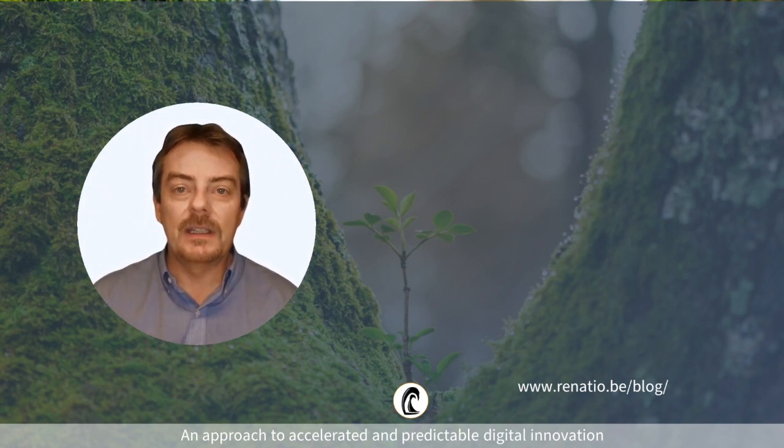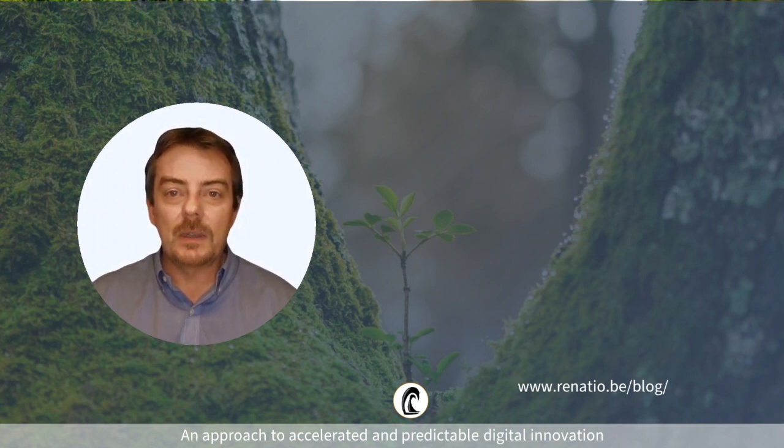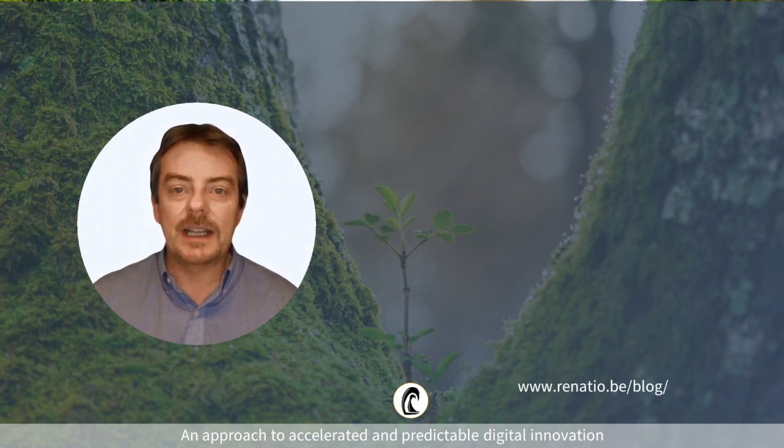Renatia proposes to measure the capacity of your team based upon a t-shirt sized capacity, where the t-shirt size is a measure of complexity. Based on a comparison with past deliveries, t-shirt sizing is expressed in extra small, small, medium, or large. They express a very short, short, medium, or long lead time. The team's capacity is expressed in the amount of extra small, small, etc. features it can deliver in a sprint, or even on a quarterly basis, being a product increment. Important to note that one medium-sized feature is not equal to small-sized features, nor 4 extra smalls.